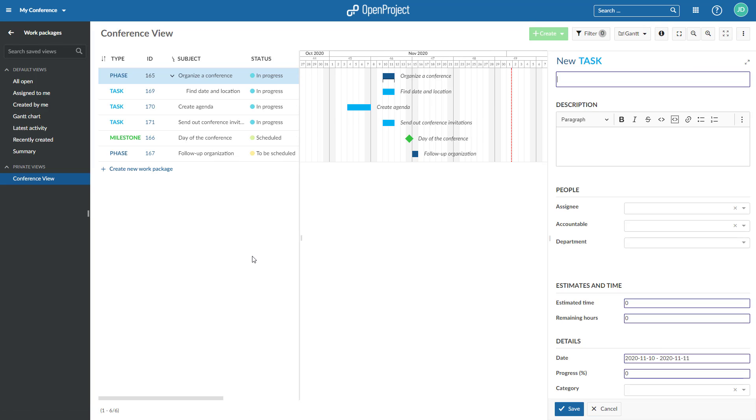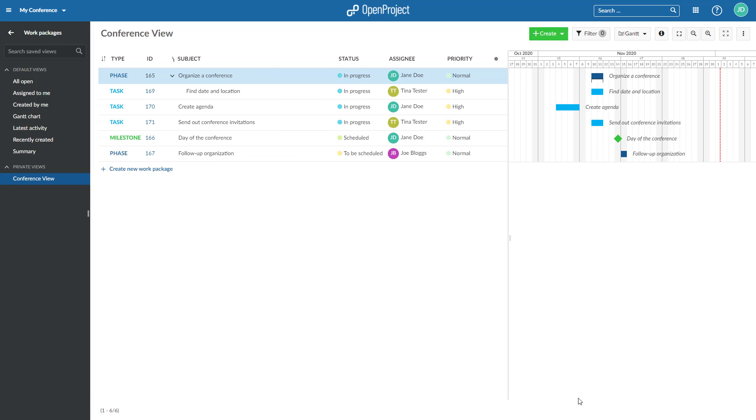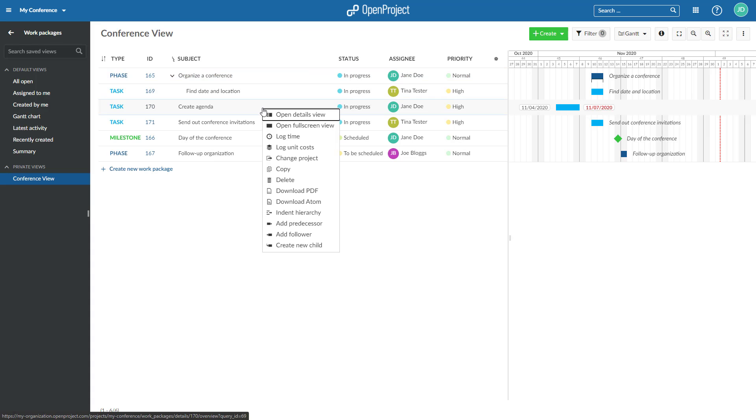To add an existing work package from the list as a child to the work package above, right-click on the work package in the work package list and select Indent Hierarchy.